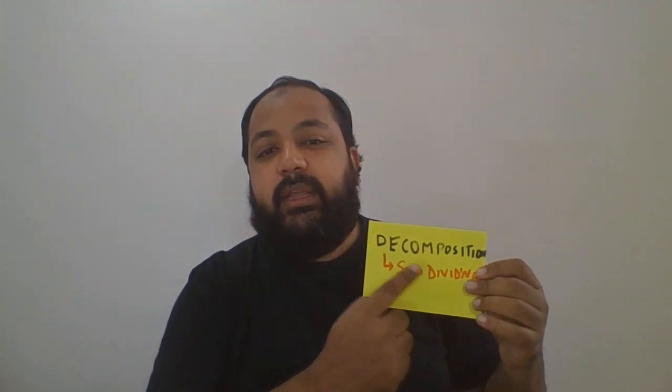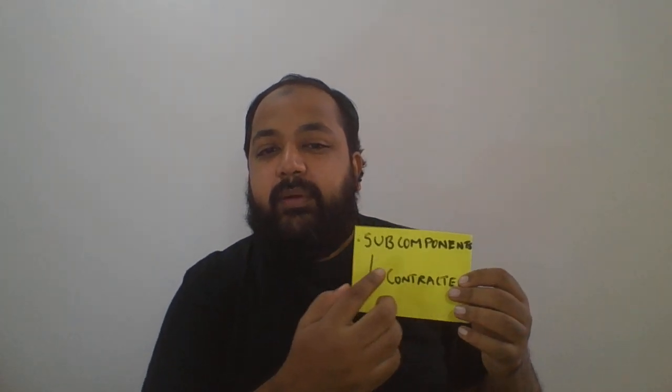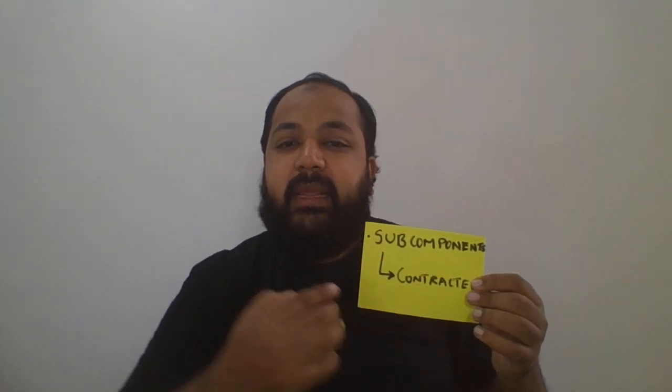So how do we get the WBS? By a tool called decomposing. Decompose is nothing but subdividing. So subdividing the big work into small work to a component level, so that even the subcomponents can be easily contracted outside. Okay, you will get the painting done by somebody else. That itself has its own WBS.